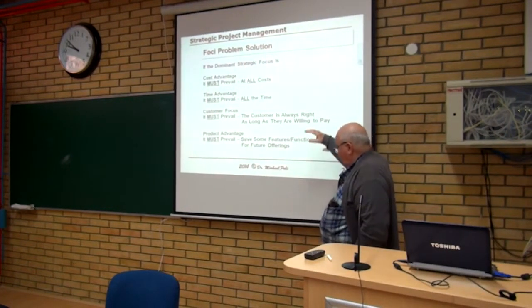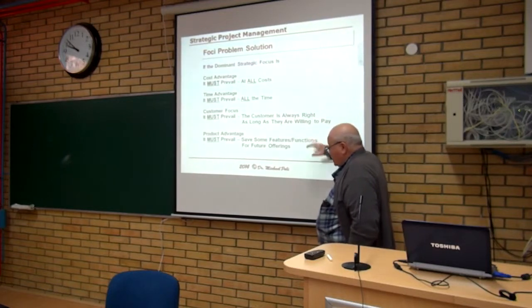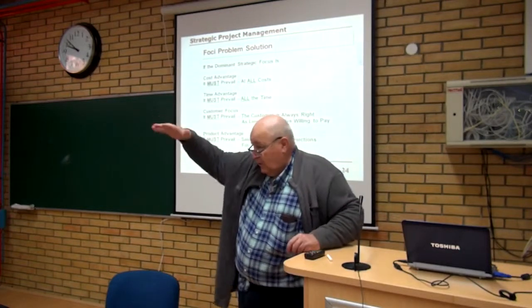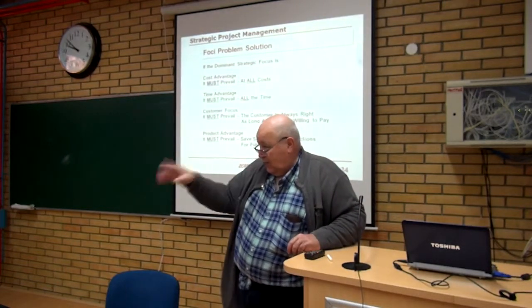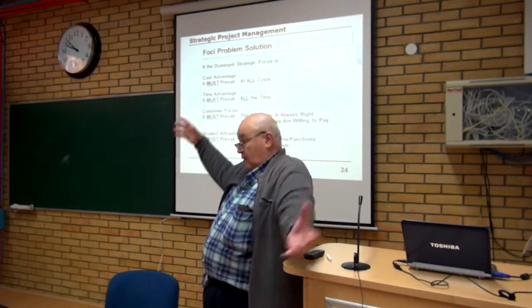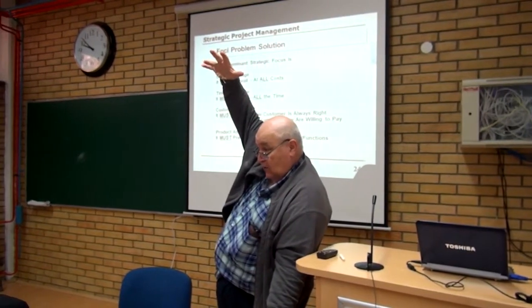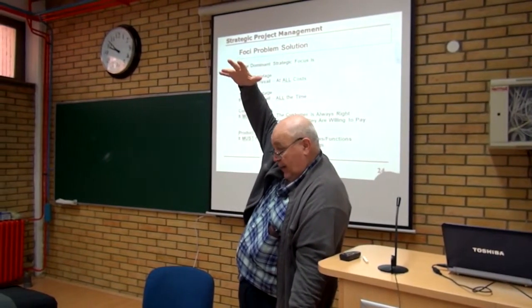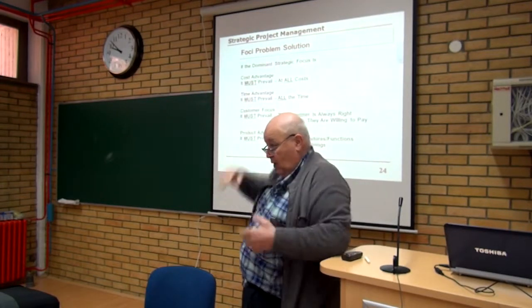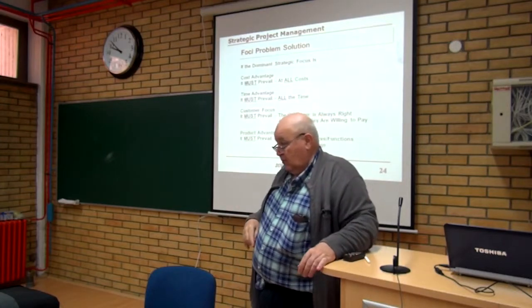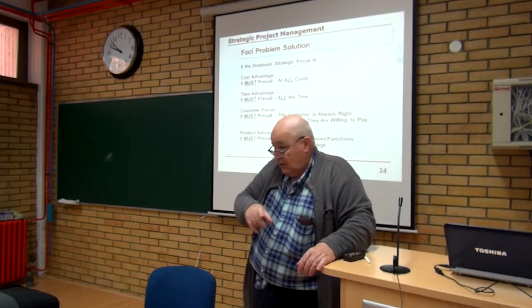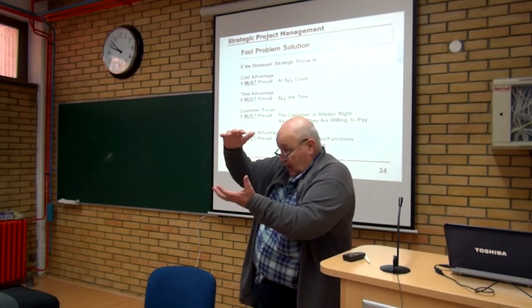And product advantage, always remember, everybody wants everything when you do product advantage. You want this, she wants that, he wants that, and you got a list of 40 things to do in the product. Guess what? I ain't doing 40 things. I'm gonna do maybe 15. Why? Because those are the 15 most important things that everybody wants. And that I will satisfy everybody a little bit.